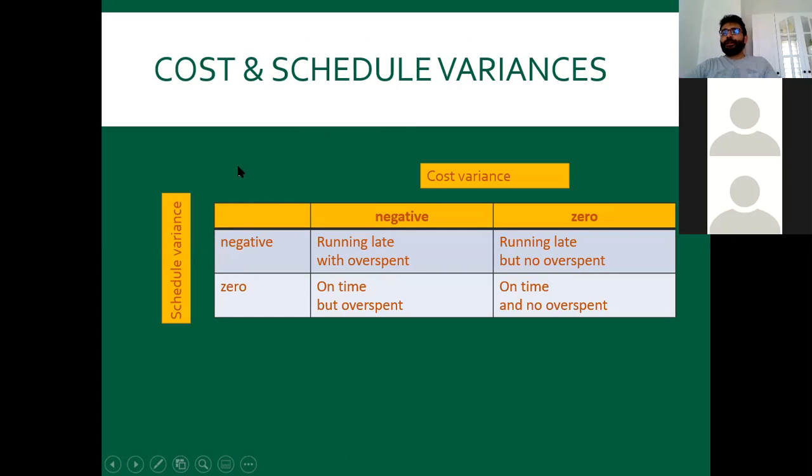So what our book says is you don't just need to look at the cost variance, but you need to also look at the schedule variance. As you see in our example, we have a schedule problem with activity C. You need to continue in the next year. Normally, you need to finish that project in 1 year, but we couldn't finish that project. So it's a problem. So if you have a schedule variance, okay, we have a problem.